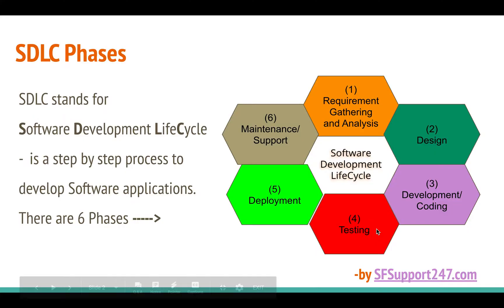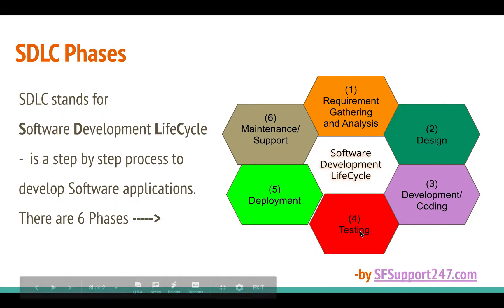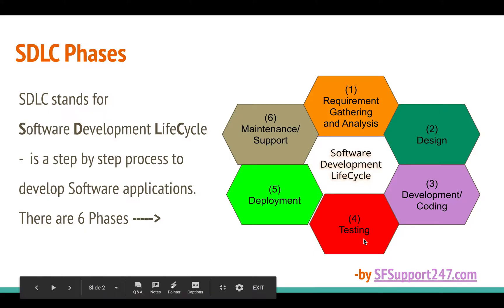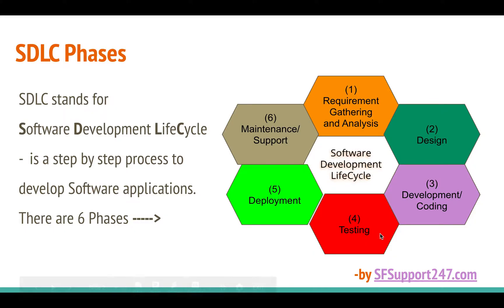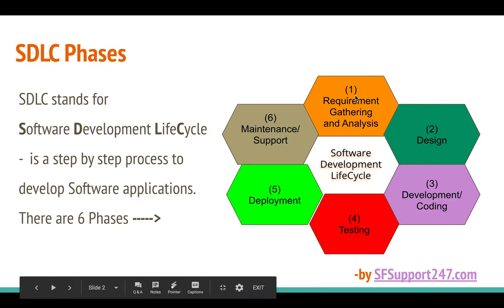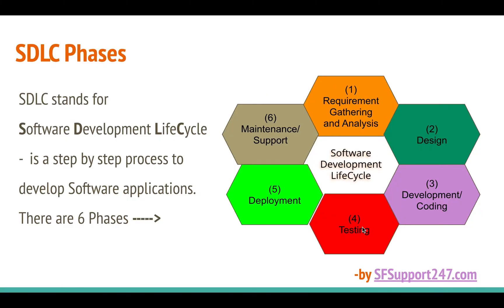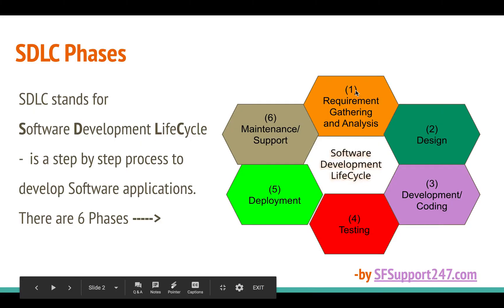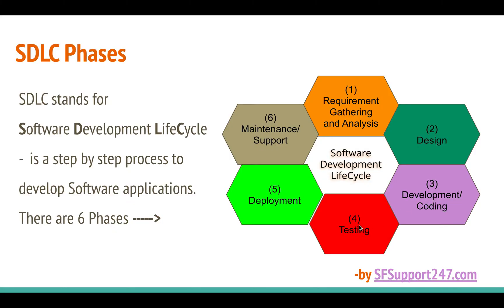The fourth phase is the Testing phase. In this phase, the developed software application or product is tested against the documented requirements. Testing happens in multiple sub-phases: unit testing, integration testing, and user acceptance testing. User acceptance testing is performed by the actual end users for whom the application is being developed, to make sure their requirements are met by the designed and developed application.